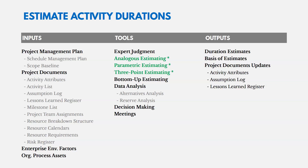Under data analysis, there's also alternatives analysis — coming up with different options for doing things — and reserve analysis, adding extra time to individual activities in case things go wrong. The key outputs are duration estimates and basis of estimates. Duration estimates are straightforward — how long things will take. The basis of estimates documents how you arrived at those estimates — for instance, if you said something takes two weeks, what was the basis for that number?